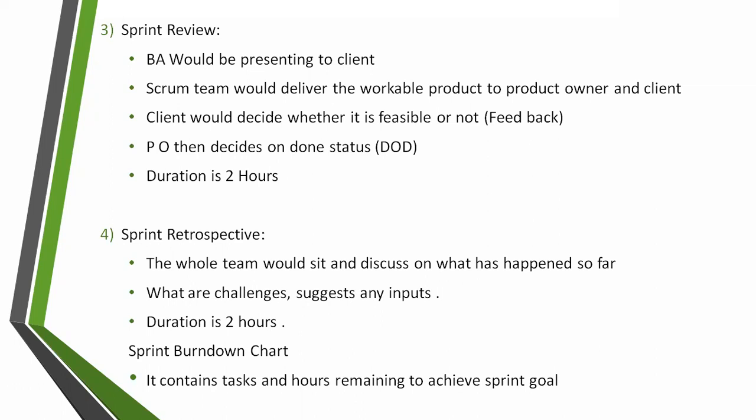What challenges did we face? Any suggestions? Because I told you the scrum team is cross-functional and transparent. Everyone can participate and express themselves. So that's the reason we are going to have a retrospection meet. Generally the duration is 2 hours.